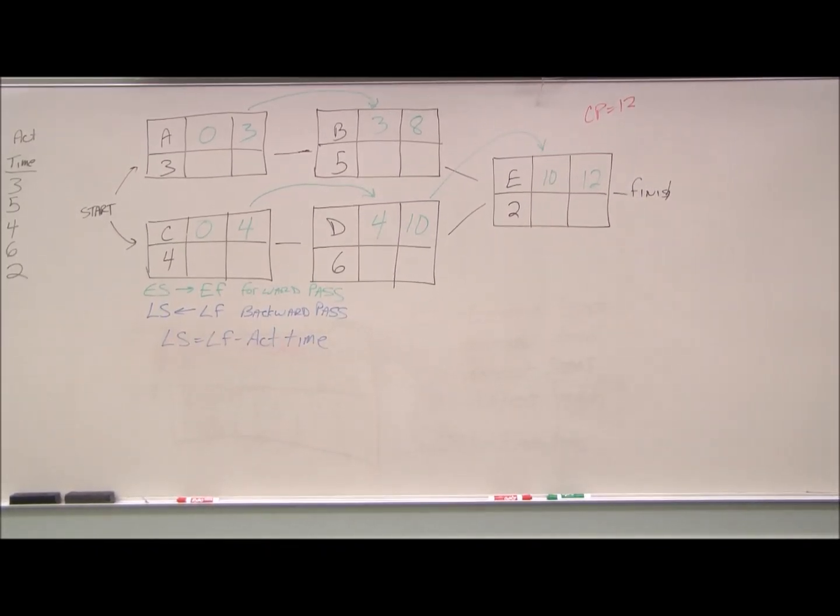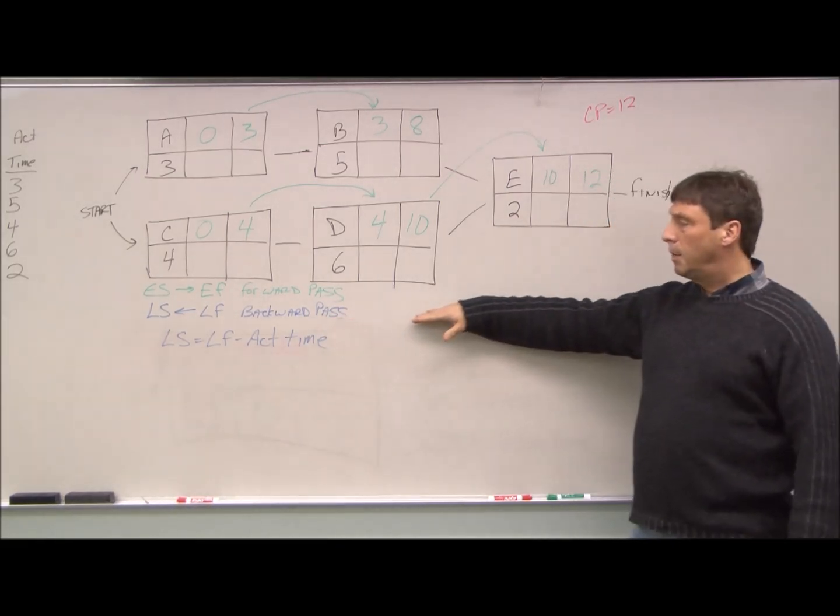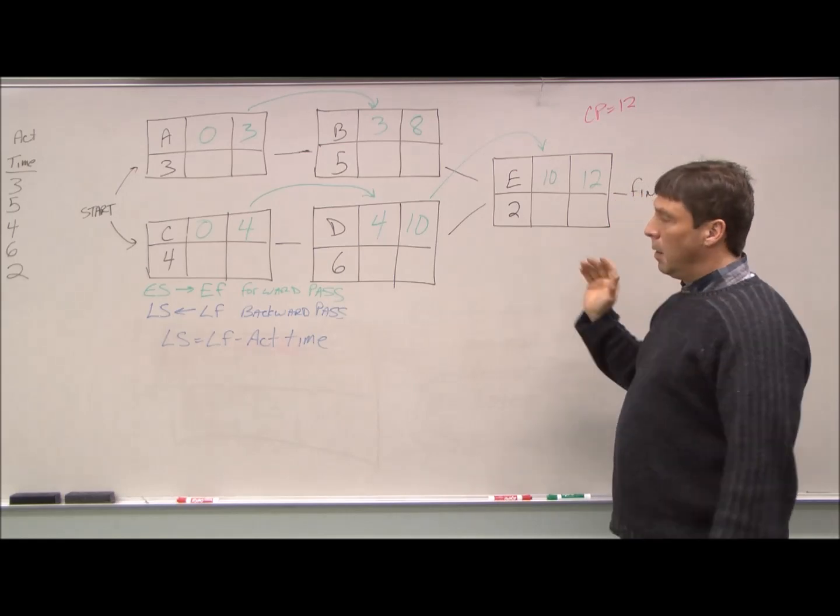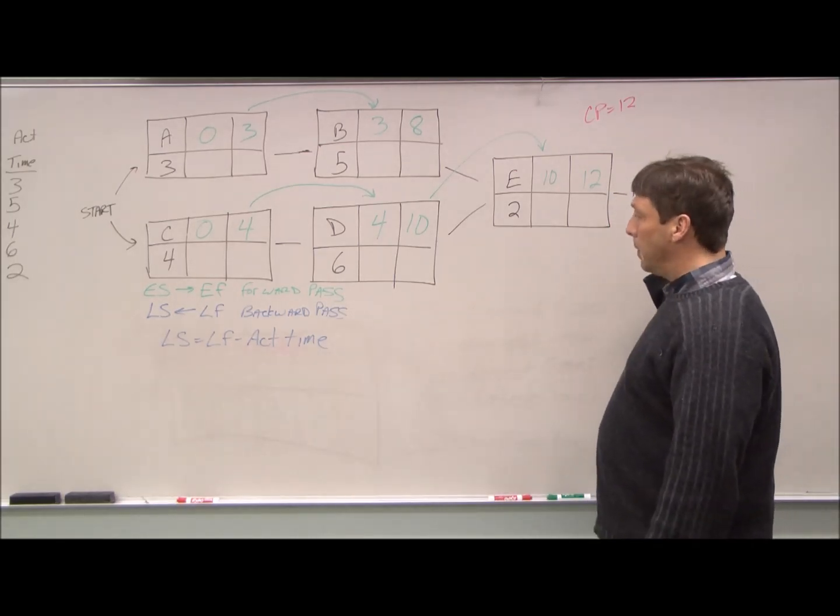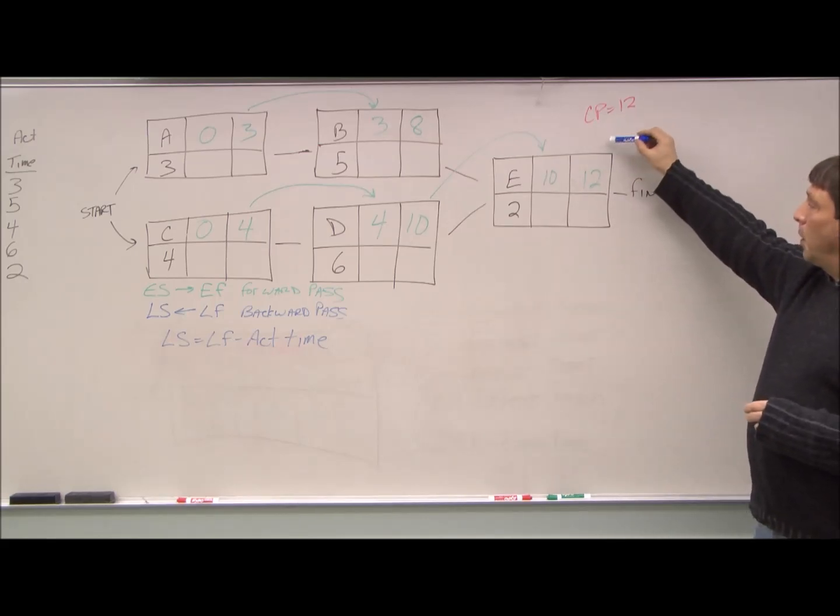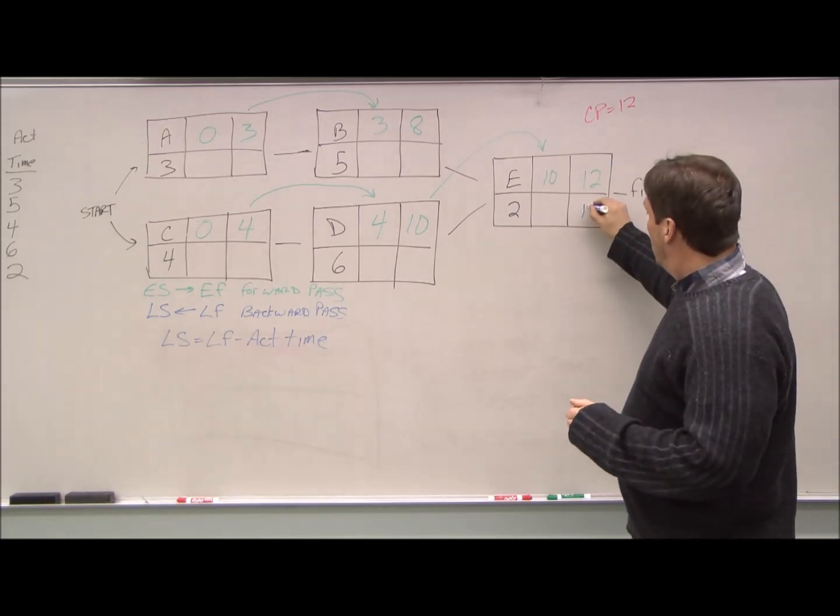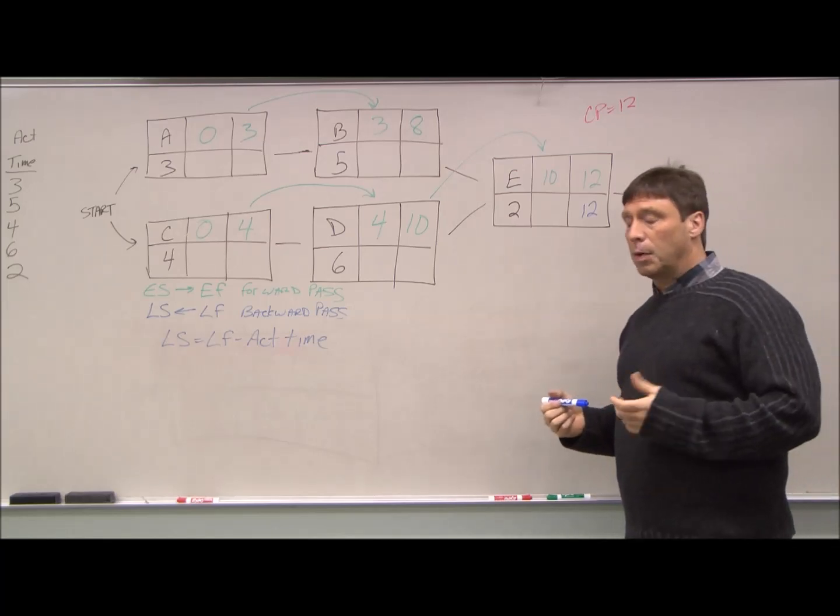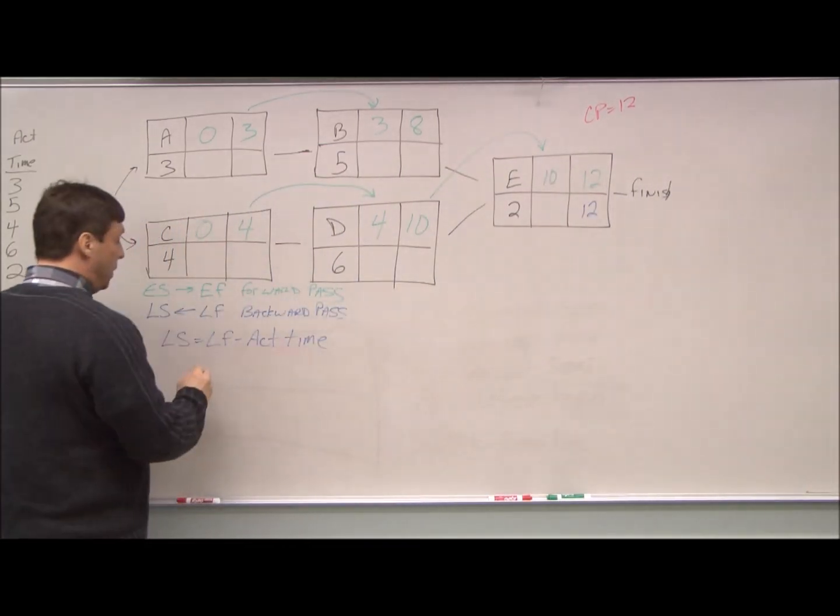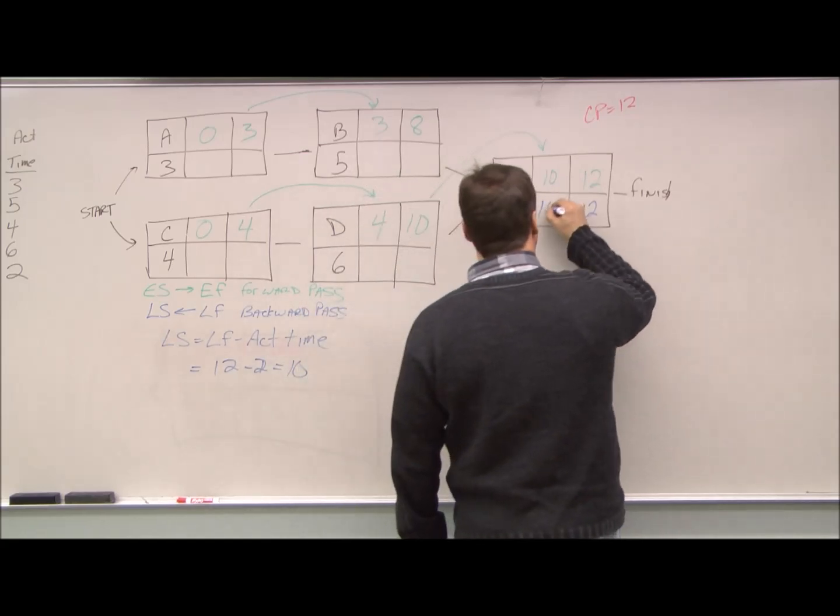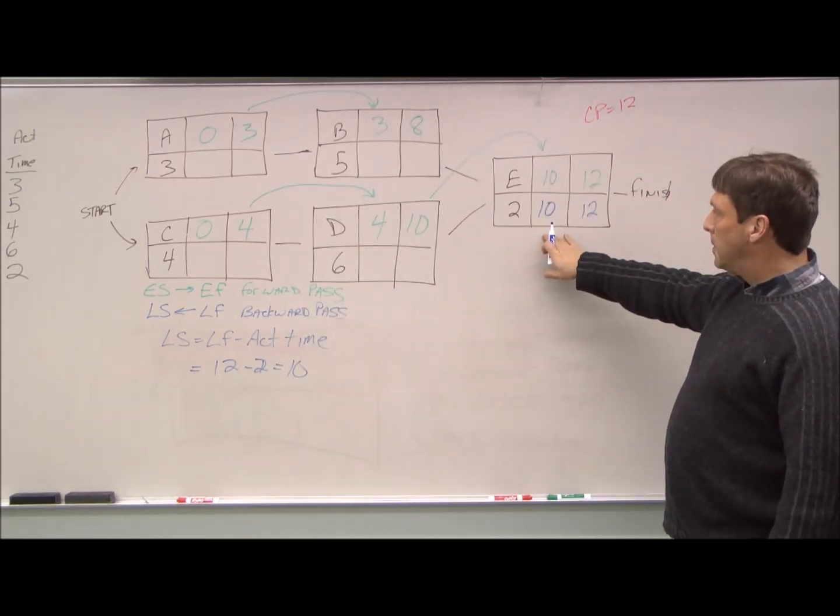All right. Now that we have the earliest start and earliest finish, let's work on the latest start and latest finish. What we did with the earliest start and earliest finish is we did a forward pass. We worked from left to right. In other words, we stop at the end here. All right. We know our critical path is twelve. We really don't need to calculate it because we've calculated it here, too. So we know we have to finish up. Our latest finish can be our critical path time if we want the project to remain on time. So we have twelve minus two equals ten. So right here we know that our latest start is week ten.